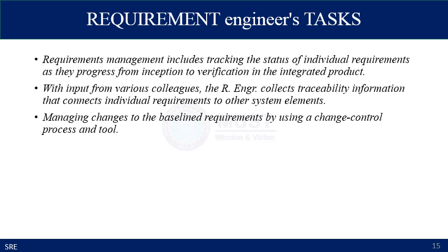Requirement management also includes tracking the status of individual requirements as they progress from inception to verification in the integrated product. With the input from various colleagues, the requirement engineer collects traceability information which connects individual requirements to other system elements, managing changes to the baseline requirements by using a change control process and tool. So a requirement management tool helps you to manage a number of requirements.